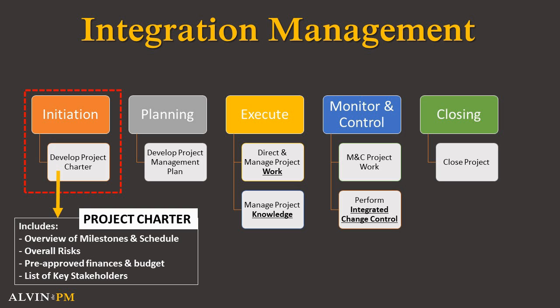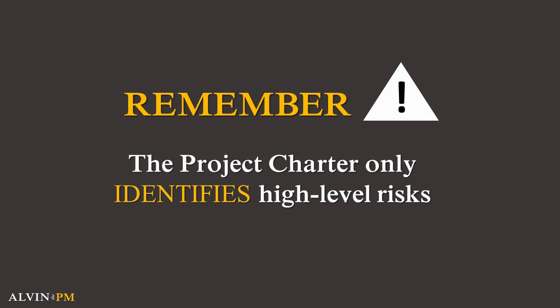But please remember, the project charter does not go into detail analyzing the risks, and instead, it reviews the high-level project risks. The more in-depth analysis of risks, both quantitative and qualitative risk analyses, is performed during the planning stage of the project.